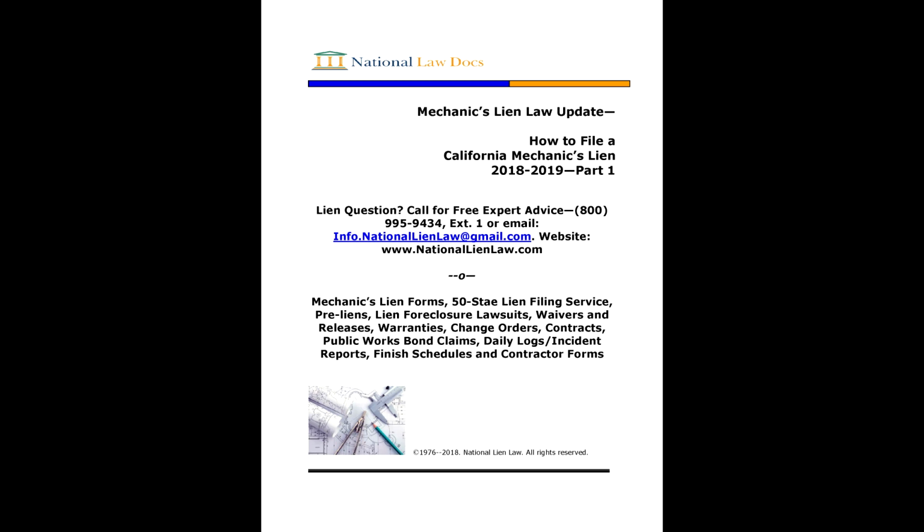Unlike the federal Miller Act, where you can only be a first or second tier subcontractor, you can file a claim of lien in California literally as a sub of any tier, and you still get a lien. But you cannot be a material supplier to another material supplier. For example, a sawmill supplying lumber to a supply house. The supply house gets a lien because they are providing material usually to a contractor.